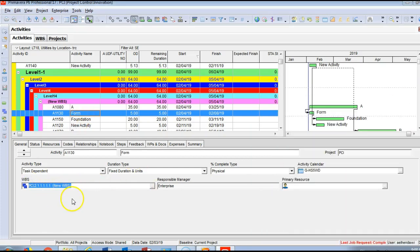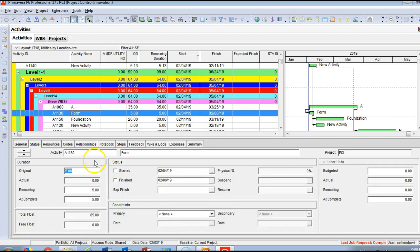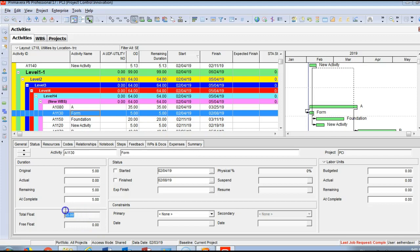The General tab also shows which WBS this activity is assigned to, the responsible manager linked through the OBS, and the primary resource. The Status tab shows the Activity ID, name, project name, and under Duration: original duration, actual duration, remaining duration, at-completion duration, total float, and free float. Total float is the float on the critical path — if this activity is delayed more than 85 days it will delay the project completion date.